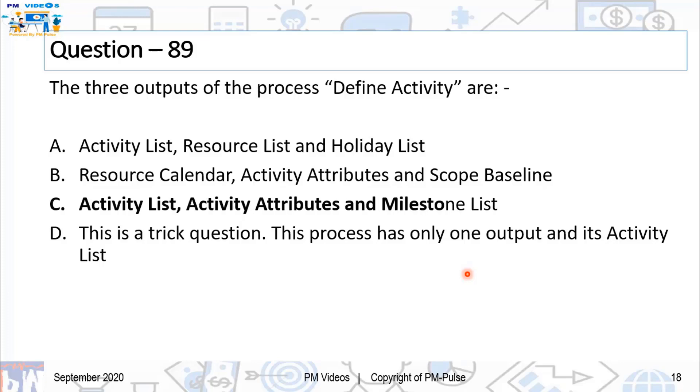And the correct answer is C, activity list, activity attributes, and milestone list. And if you like, go ahead and subscribe. And even if you don't, I have the best of wishes for you. Go ahead and ace PMP exams, and I really hope that we become a part of your PMP journey. Thank you for watching, and I hope that you do extremely well in PMP exams. Take care.